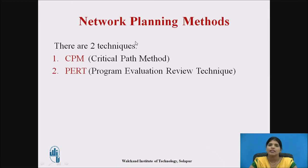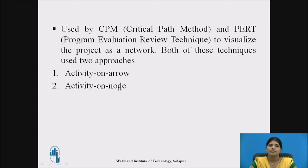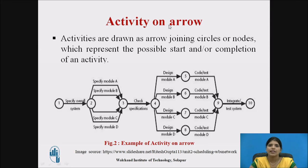There are two techniques for network planning methods: the first is CPM and the second is PERT. Both CPM and PERT visualize the project as a network and use two approaches. The first is activity on arrow and the second is activity on node. In activity on arrow, the activities are drawn as arrows joining circles or nodes, which represent the possible start and/or completion of an activity.